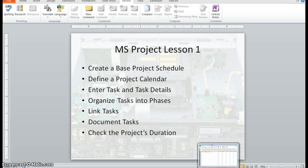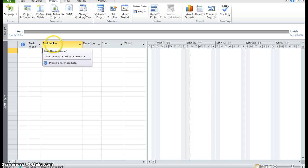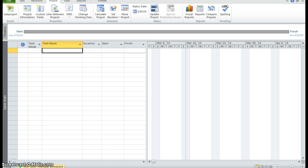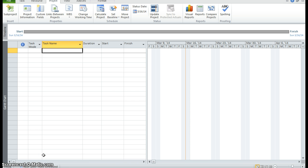Let's open up project. We're in the Gantt Chart View. You can see right below the field task name is where we're going to enter our tasks. But before we begin entering our tasks, we have to make sure that project is going to schedule our tasks automatically. So if we go down into the status bar and click on the new task manually schedule command, we can enable the auto schedule command. And now it is enabled.